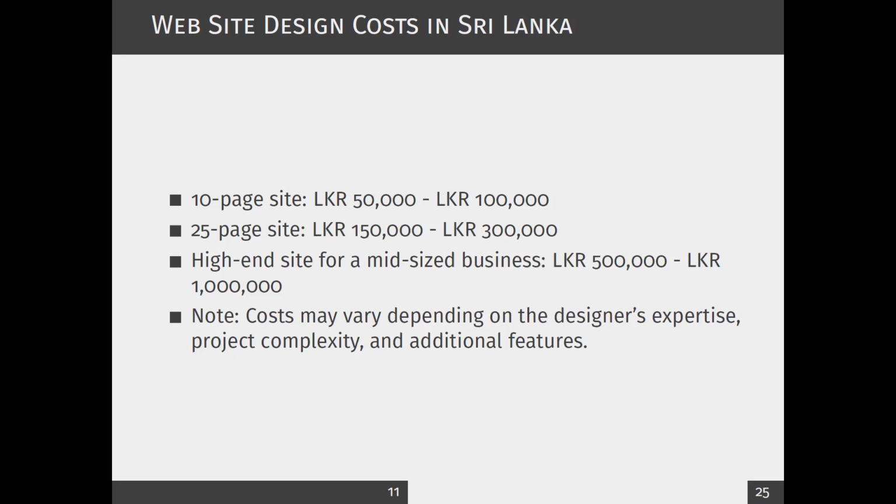And if it's a very large high-end site for a medium-size company, then it's 500,000 to 1 million, right? But if you ask me why there's a range, minimum to maximum, it's because this cost is based on design expertise, the project complexity, and also the additional features you are providing.